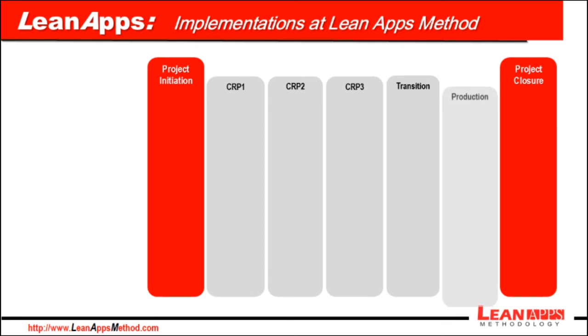Fifth phase is production, and the goal here is to decommission any legacy system and co-support the system with the client's personnel. Remember that the customer will inherit the system, and therefore the consulting team and the client's team should have a mature process in place to respond to error and question requests to attend a steady knowledge transfer. I will give you more tips in the restricted area for downloads, but you may also contact me. New enhancement requests could arise in this phase, and they should be prioritized for future releases or projects.